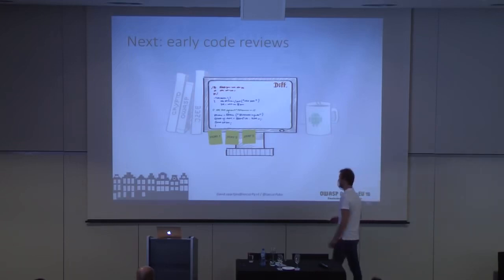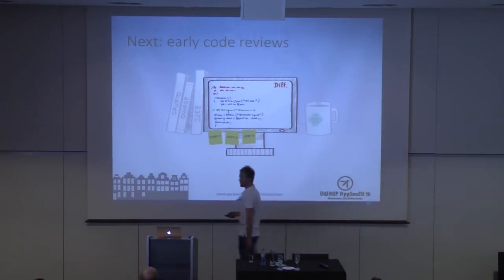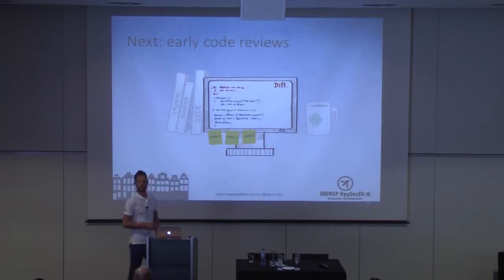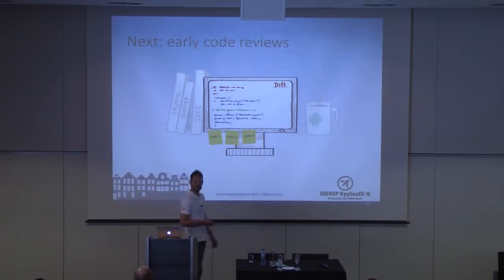So this was working out quite well, and I kept up with this for I think 3 or 4 sprints, and then I started to fully lose it, because this is in no way able to combine in your planning with all your other activities. Up front you don't know when they finish a story, right? This can be today and this can be tomorrow. And you don't really know how much time you need to check it because you don't know how much code is in there. So I needed to cram all those activities in my planning, and I was starting to lose it. So this was a dead end, but from a software team perspective, we were on the right track.